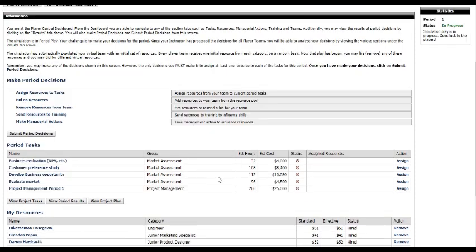Other things that are worth noting here are estimated hours and estimated costs. That might clue you in as to who might be valuable to use, and whether you need 1 or 2 persons to do a particular task, at least from a baseline or planned perspective. Of course, anytime you add more resources, it costs you more for the task, but it speeds things up. So that's a good philosophy to keep in mind.